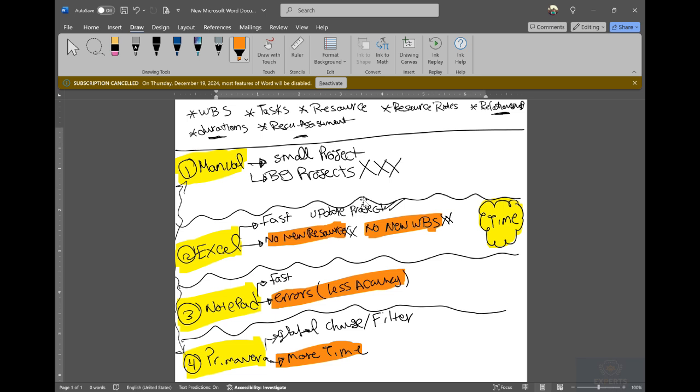So all this is considered in some companies as an average. They calculate all this as a summation and get an average and give you this detail at the start of a project. Take the cost of the labor as 200 real, 210 real, 180 real, whatever. So you will consider this in your report. So this is very important.